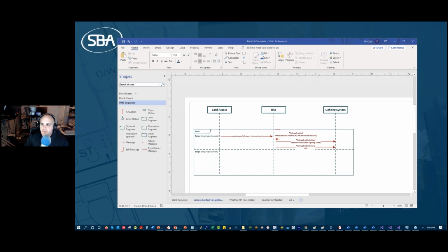It will teach you estimating. It'll teach you the 1/3 concept, which is 1/3 material, 1/3 sub, 1/3 labor, which is actually not specifically accurate for integration because that tends to be more labor and tends to be very little material and very little sub, which is one of the big shifts when you're actually estimating integration.